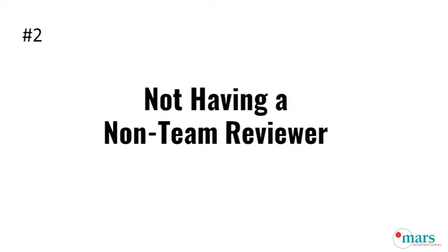It is really, really important that for a spec to be a useful document, it's got to be understandable by everybody. And if you're getting too close to it, what may seem obvious to you, or things that may not be stated that you have in the back of your head, it's going to be picked up by somebody else. So I think it's really, really valuable at all stages of the project to have a spec reviewed by somebody that is not involved in the team at all.